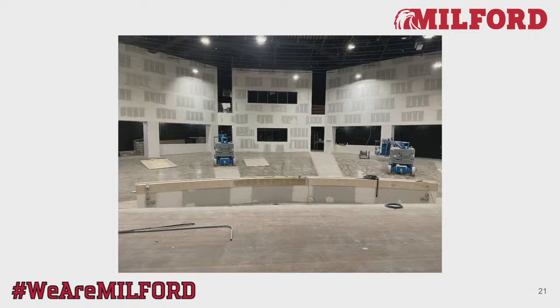It is interesting from a constructability standpoint. That floor is sloped like most auditoriums are, and the slope is great enough that the lifts we have to get in here won't actually work because they have to be leveled to work. So what you see here is a little ramp that they built to level out those lifts as they're working.